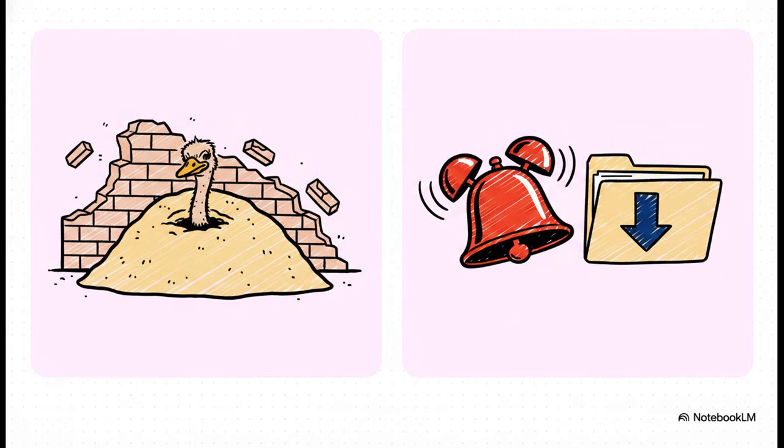Which leads us to a very dangerous practice, delaying the recording of a known expected loss. Imagine management fully knows a project's costs will exceed its contract revenue, but they decide to just hide it for now to protect this year's financial statement. AS7 has absolute zero tolerance for this. An expected loss must be recognized immediately in full, completely irrespective of the stage of completion. There's no hiding under AS7. The loss hits the books instantly, so investors aren't misled.